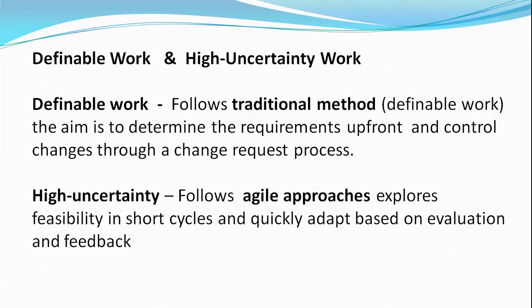For example, let's take a banking tool, a customer-usable banking solution tool. The client, let's assume like ICICI Bank, may not know exactly end to end what they want, but as the project proceeds, they get clarity. In that case, we are going to build the entire product in small pieces. That is why we say we are going to explore in short cycles. And when we keep building in small cycles, we get clarity of what exactly the requirement is.